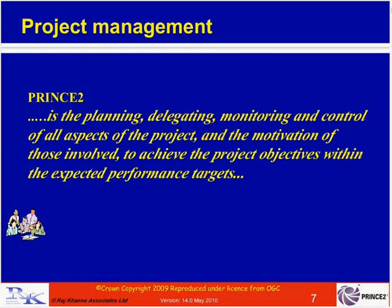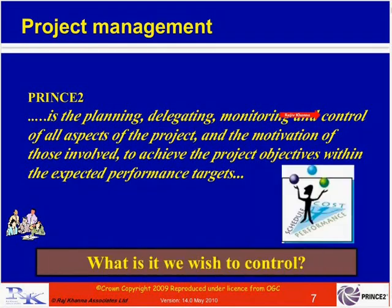According to PRINCE2, whenever we manage a project we need to plan what we are going to do, delegate the work to different people to produce, and while the work is being done, monitor progress and ensure everything is within our control parameters. The elements of the project we wish to control are: time, cost, scope, benefit, risks, and quality. Scope is what is included and what is excluded. Putting mechanisms in place to control these six elements will increase our chances of success.